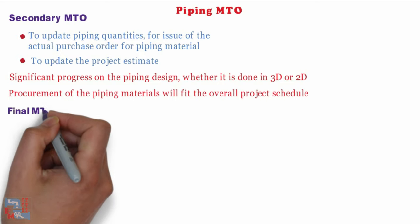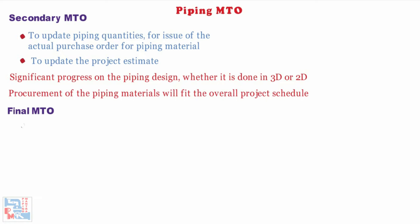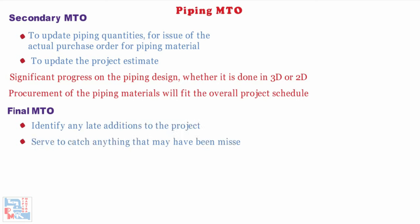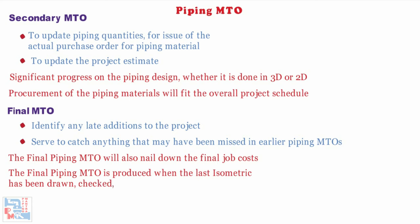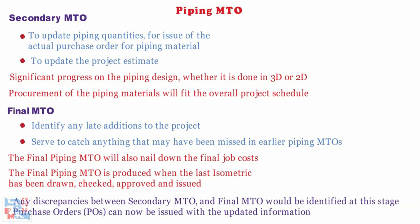Now comes final piping MTO. The final piping MTO will identify any late additions to the project and should serve to catch anything that may have been missed in earlier piping MTOs. It will also nail down the final job costs. The final piping MTO is produced when the last isometric has been drawn, checked, approved, and issued. Any discrepancies between the secondary piping MTO and the final piping MTO would be identified at this stage, and purchase orders can now be issued with the updated information.